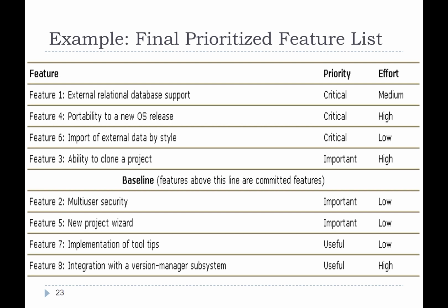Remember, this line over here means there's a likelihood of 99% that you will be able to make it. That's one of the reasons why you put the line here. If you feel like this is the minimum, and the chance of me completing it with success is 5%, then what's the point of even beginning this project? It's doomed to fail. This is one year down the line, but I know by the time I finish feature 3, I'm only going to need 6 months, so I'm already putting a nice buffer there. Now I finish feature 3, I move on to feature 2, then feature 5, then feature 7, and so on, one feature at a time.